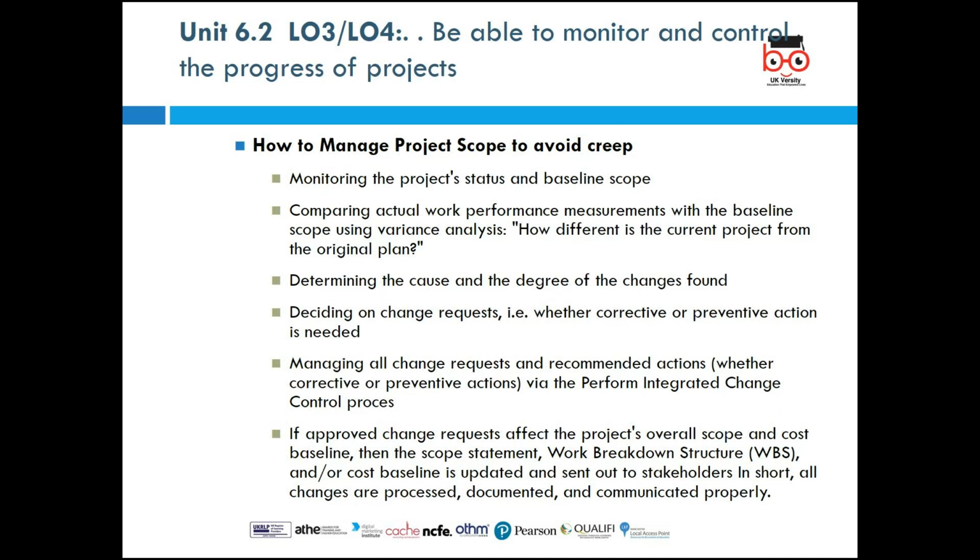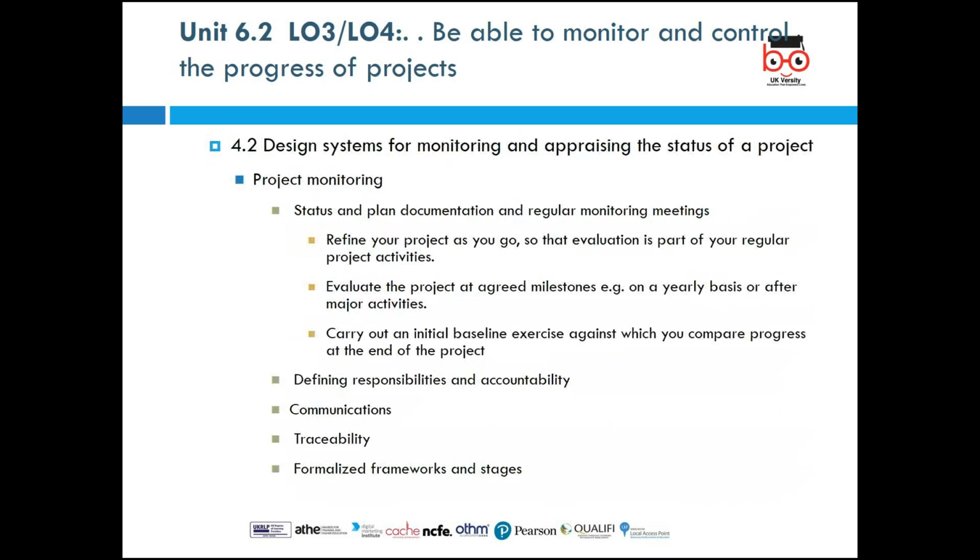So if you have broken down the project into different phases, then once you put in any change request and the change request is approved, that work breakdown structure needs to be updated, and all stakeholders must be informed. And that is how we'll be able to manage the scope to avoid creep.